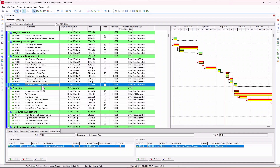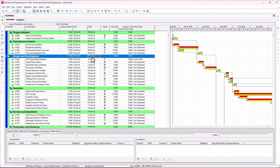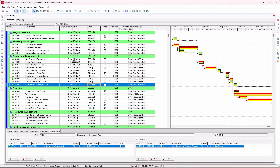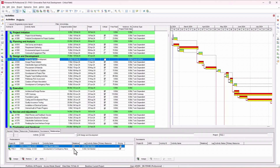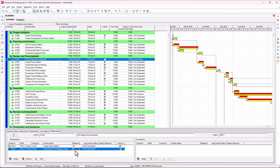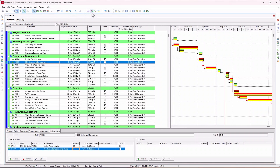Now go to the last activity in the WBS — in this case 'Development of Contingency Plans.' You can sort your program by start date or finish date to confirm it's the last activity. You can see its end date is the 2nd of June, so that's what I'm looking for. Click on this activity, then add it as a predecessor to your level of effort with a finish-to-finish relationship. Now schedule your program — after scheduling, the level of effort duration has updated to 48 days.